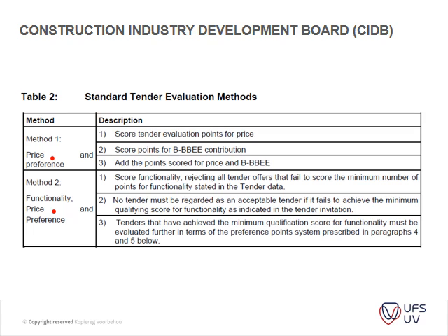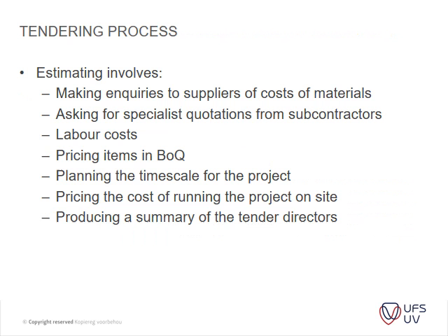For instance, their health and safety reps have to give you a good reference. You have to have a green star rating, that type of thing. You have to have at least done a building of 3 stories and higher before. So you have that pre-qualification items that you can build in. So just take note of that, it might be required in practice.